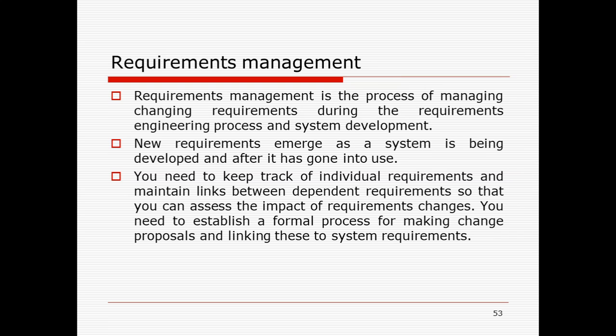To manage the requirements, we need to keep track of the individual requirements, and also maintain links among the dependent requirements, so that you can assess the impact of a requirement change. If a particular emerging requirement is dependent on some other requirements, that dependency needs to be tracked so that you can easily manage the impact of the requirement change.